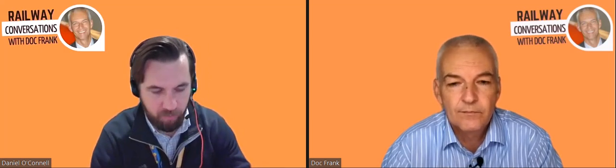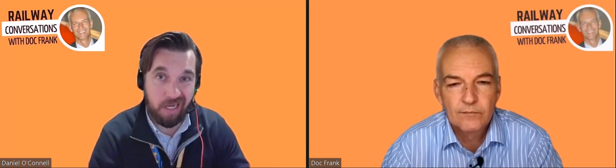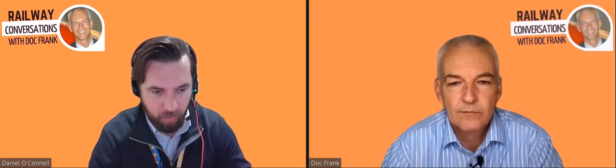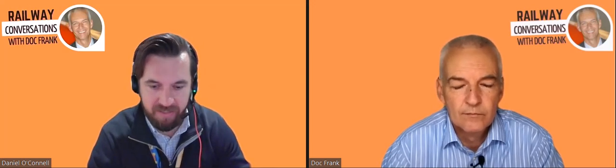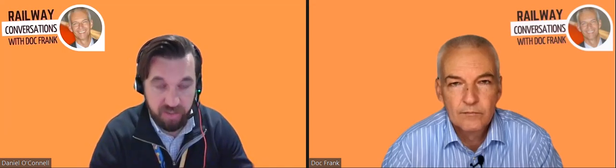Yeah. So we have a requirement. What feeds off that is obviously the tests that we need to do. So that includes the interface systems, the durations. Once we have that, what I would call the test database, let's say we have 1,000 activities that we need to perform. We know that these are safety critical interfaces, priority calls. Then we try to look at what can be tested off-site.